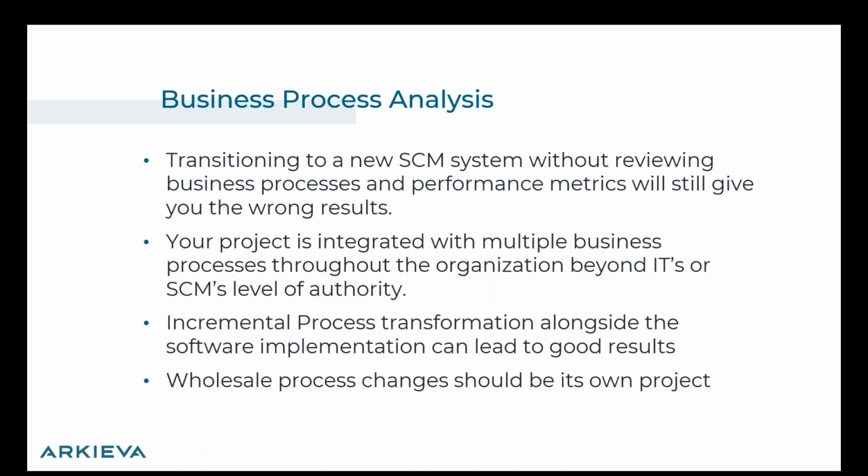And if there are incremental process transformation needed, then it is a best practice to do it alongside the software implementation. On the other hand, if you need wholesale process changes, then of course you may need a brand new project where you may have to hire an external consultant to run the project for you.